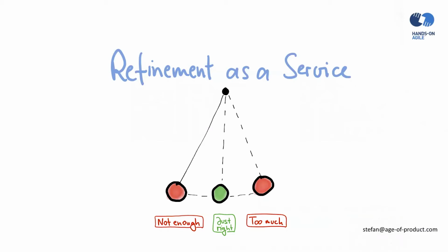I've seen a team using a definition of ready as some kind of stage gate process, rejecting issues that actually were okay, but because there was a small thing missing, for example, because the designs were not ready the day before the sprint was supposed to kick off. And the designer said, okay, I'm able to deliver this tomorrow. And they said, nope, definition of ready, designs have to be available. Otherwise, it's not eligible to come into the sprint. I mean, this is really not the way you should work. So this is an issue that teams sometimes have, but something that you really can work on.